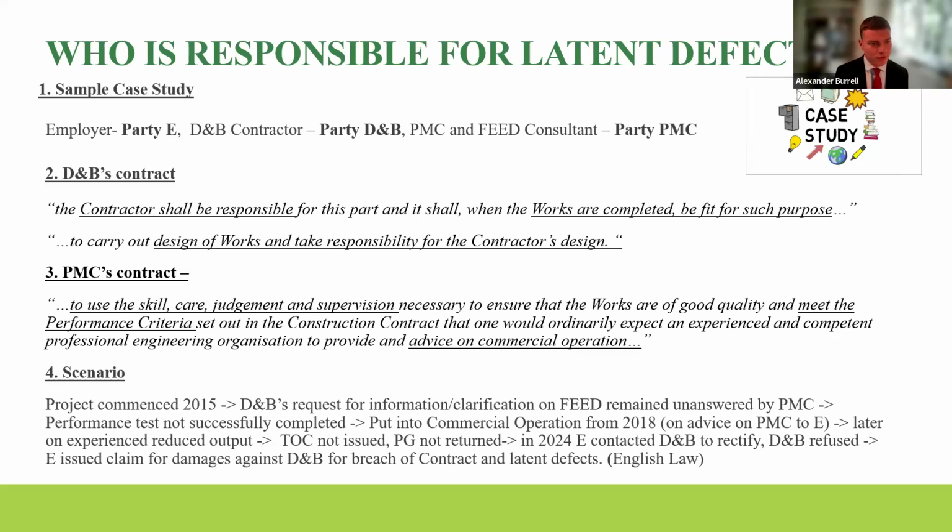Finally, briefly, sorry, I've gone on a bit. Under UAE law, which I know some of our listeners might be interested in, the periods are different. For a commercial claim, it's 10 years, and for a delict claim, it's actually similar to English law, 3 years from the awareness of harm and the person responsible. But yeah, so those are important points to think about before you bring a claim.